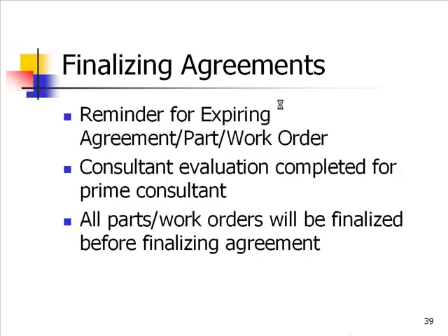Before an agreement will be finalized, the consultant evaluation must be completed for prime consultants. And all parts or work orders will be finalized before the agreement is finalized.